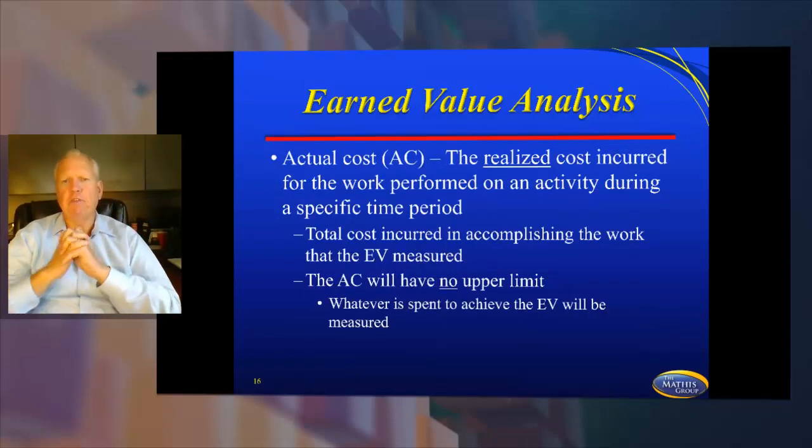Actual cost, AC, the realized costs incurred for the work performed on an activity during a specific time period. Total costs incurred in accomplishing the work that the earned value measured. The actual cost has no upper limit. Whatever is spent to achieve the earned value will be measured.